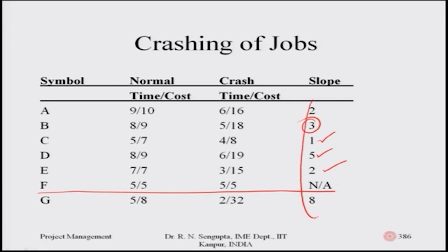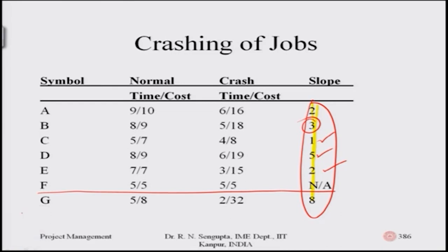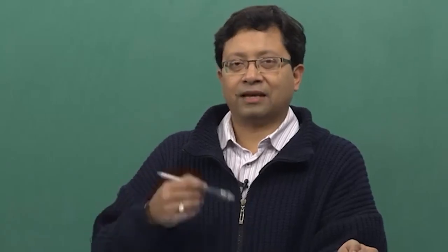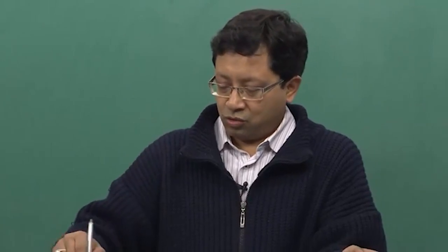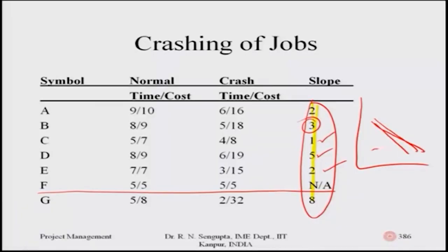These circled values represent the linear costs — the slopes, or marginal rates of change, which are fixed. The tan of theta is fixed. In cases where costs are non-linear, I did mention using a small diagram how you can linearize them using a step function approach.